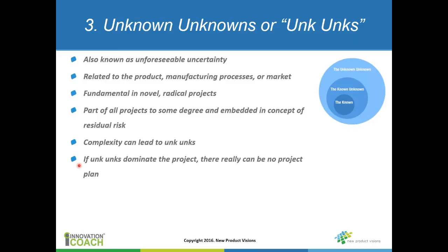The bottom line is, if unknown unknowns dominate the project, you really have no project plan. I mean, you can have a plan, but the next day it's out of date. So if you've got a project that's dominated by unknown unknowns and you start off trying to micromanage it with a high granularity Gantt chart, you're probably wasting your time. You really should be focused on what is it that you don't know and how can you learn it as quickly as possible. And we're going to talk about some of those methods to manage that type of risk.